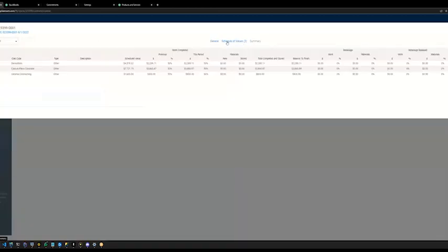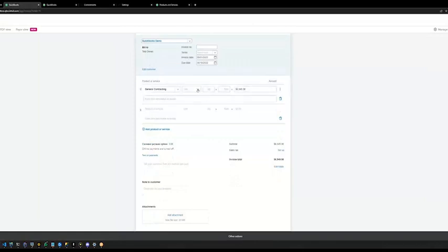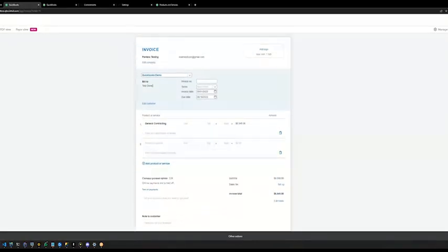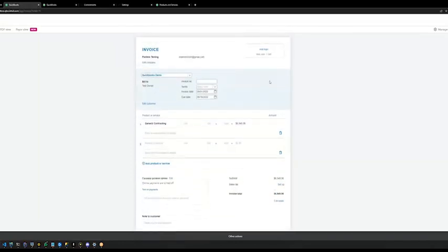Trade shows correctly. And then I can go to the Sync to ERP button right here, just like on the contracts and contract change orders. And it will synchronize this to an invoice in QuickBooks. And you can see here I have a single line item for $69.49.98. It selected the owner, selected the invoice due dates properly based on the selections, and it created the invoice. So this invoice can then be used to collect payment.